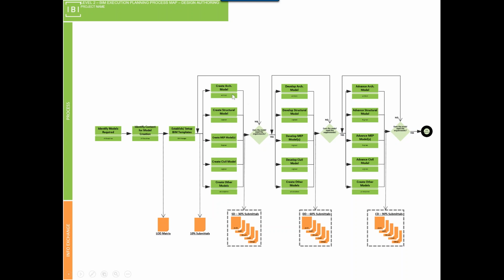You better be linking those models together, and we make drawings. And then somebody validates, are the models good? If not, keep going. If yes, proceed to 60%. If they're good, proceed to 90. If they're good, you're done the process, right? And that's what a process map is. And when you look at this, you think, kind of makes sense, kind of non-technical at all, right?